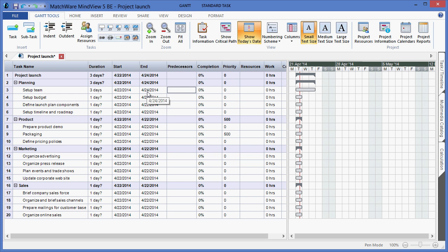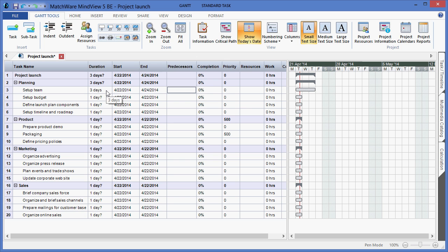I do not want to get in the habit of affecting a start date and the end date. I will choose one or the other, and use the duration to forecast the opposite.